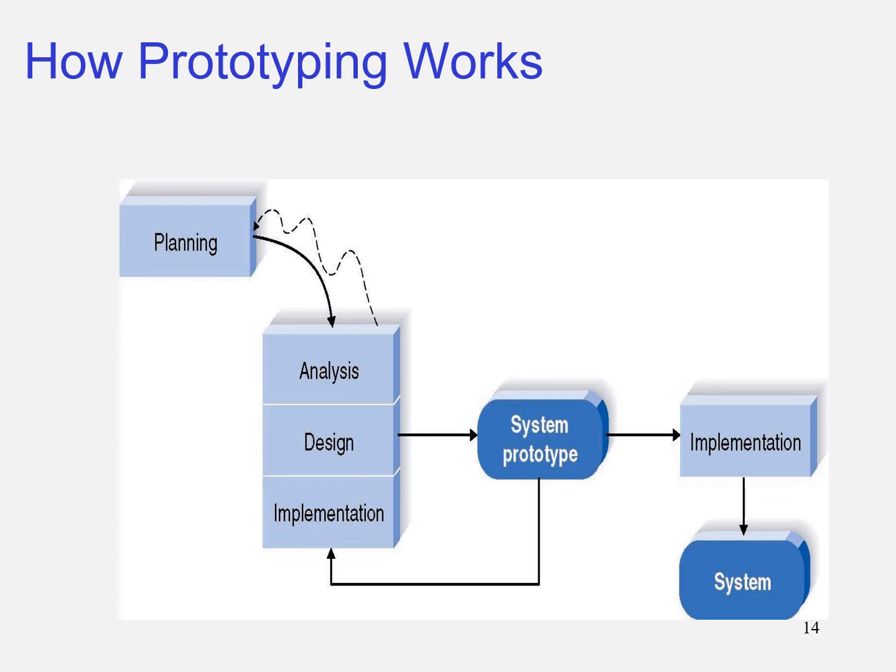So what is done? The planning is done the first time, and then analysis, design, and implementation are actually done in parallel. Okay, maybe you do analysis, design, and then you do analysis again, or maybe you do design, implementation, then you go back to design. This is done so that you create the prototype of the software. It's not full scale yet, it's not the original one yet.